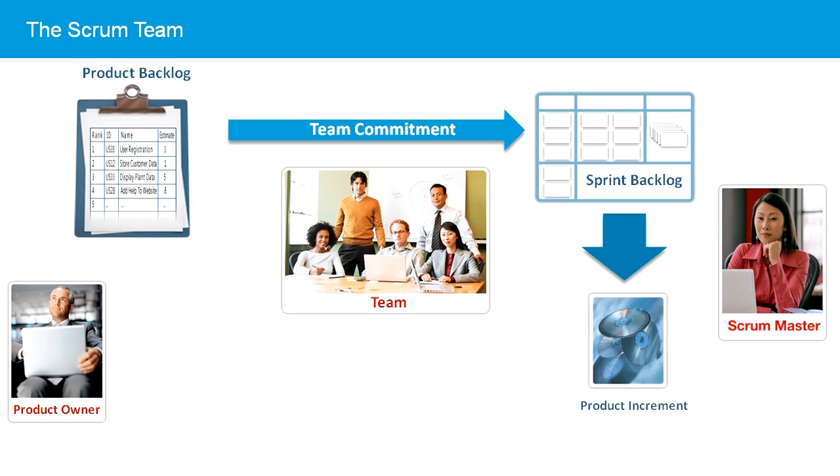During the sprint, the team works together to complete all the tasks in the sprint backlog. They are aided by the Scrum Master, who holds the daily Scrum meetings, ensures the burn-down chart and sprint backlog are continually updated to show completed and in-progress work, and removes any impediments that are blocking the team's progress. The Scrum Master also protects the team from outside influences, so they can focus on their committed work.